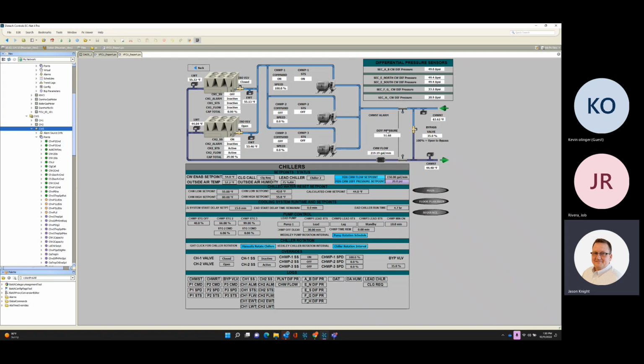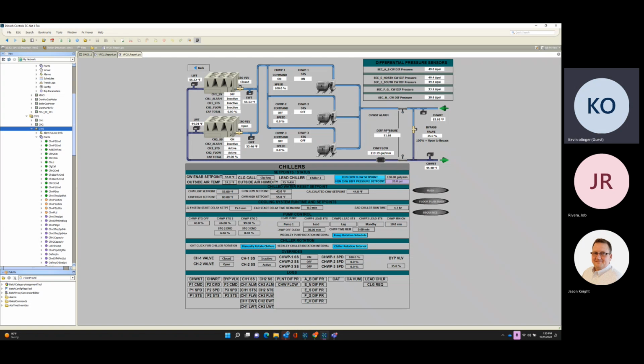Yeah, basically Collins is just doing the commissioning for completion. Okay, here's what they asked us to build. This is what got built. Did we do that part of it? Yes or no? And so then he's trying to meet the contractual requirements for Skanska.